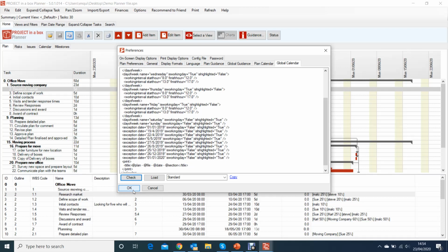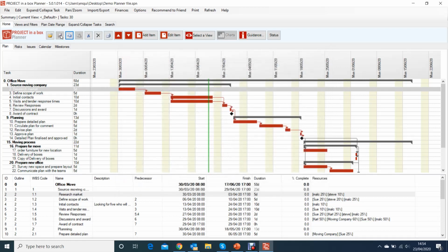So by putting them all into your template for a couple of years ahead, you can then be confident that during that timescale every project that's run with one of these templates will be covering off those days nicely. If you have planned closures for your factory, for example, you can put those in. That's also a common way of doing it, and obviously changing shift patterns to match the working hours that you're running. So that's a key part of changing our templates from the default one that you get to match the things that are right for you.